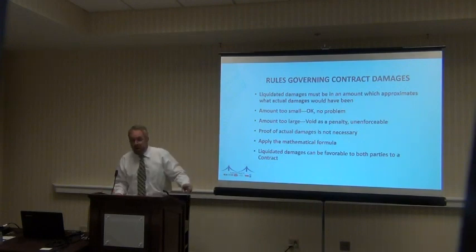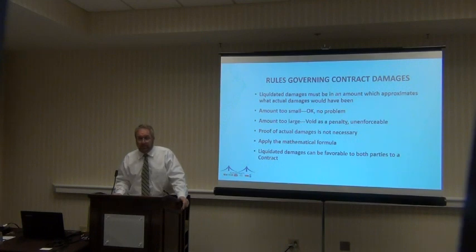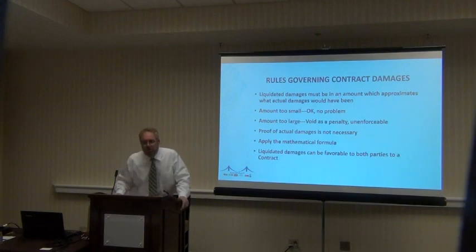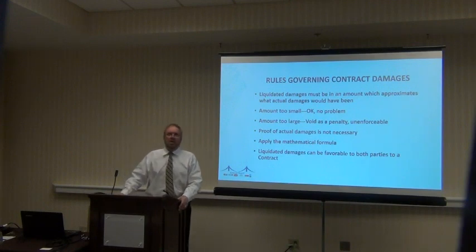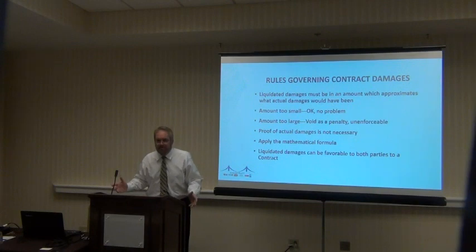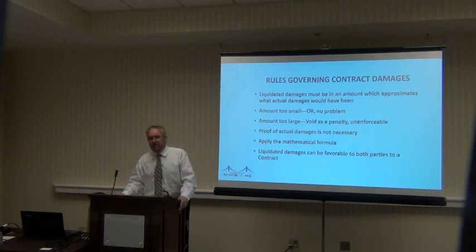So the amount too small, it's there, it's going to stand. If the amount's too big, it's arguably unenforceable. Now, how many times have I actually advised the client, oh, just go ahead and sign it. That's so big, you don't have a thing to worry about. Yeah, Mike Haefling said I have some stupid clauses, but not that stupid.